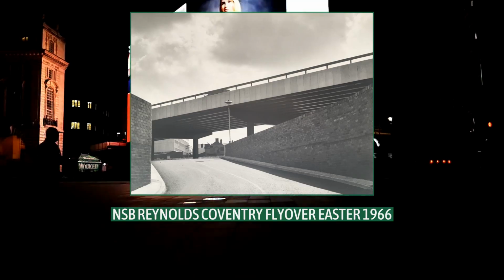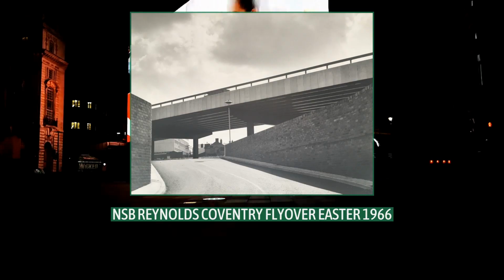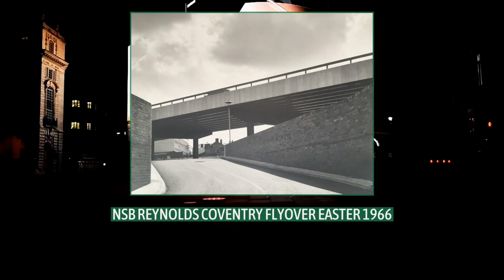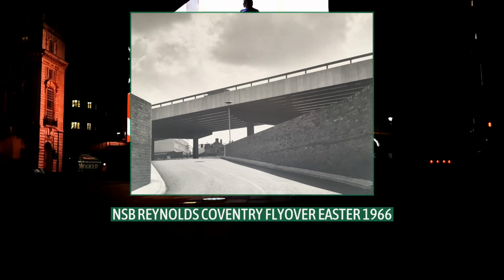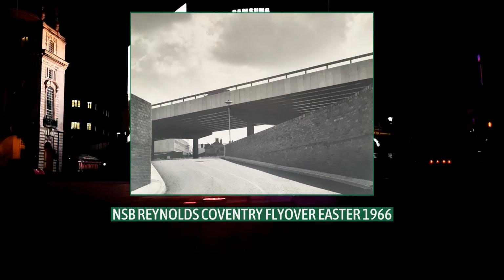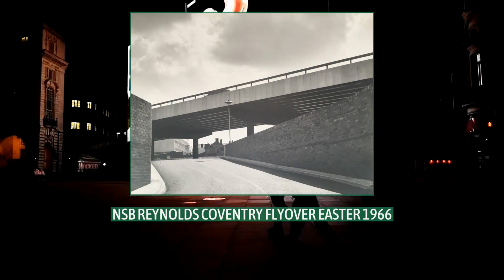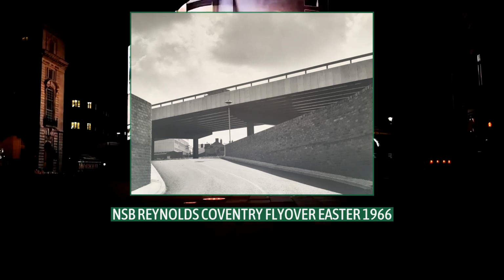This opened up a through route from Junction 6 in the south all the way through to Junction 1 in the north, via the Moat Street flyover and the Stage 4 slip roads, allowing traffic to bypass the city centre for the first time. The Hill Cross flyover and Holyhead Road underpasses were both opened on 18 July 1966, 3 months ahead of schedule, with construction workers removing the barriers and allowing traffic to flow.